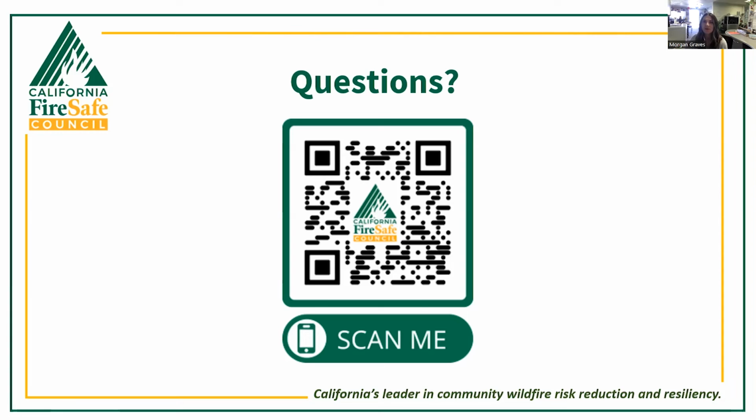Thanks for confirming. And with that, the last thing I'll say, I'm sorry to be dominating this, but I assume it's okay if I don't have the capacity to map myself, to get a contracted person to help me with that, or a part-time employee at the RCD to help me with that. That would be fine if there's more than one person charging staff time to this grant. Yes, you can definitely take the team approach to this. There is a contractor line item as well. And in the handbook is an explanation of what we ask for any contractor source documentation. So submitting your invoice, if you are working with a contractor. If it's an existing RCD employee, they can just charge it to personnel, but just include all that in your budget.